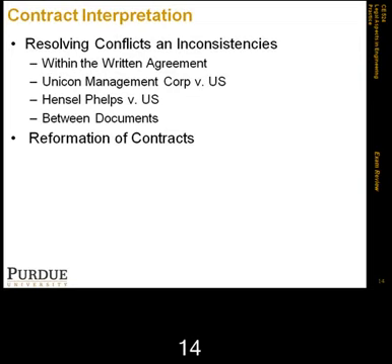Another important topic we talked about is something called reformation of contracts. This is a remedy that's granted by a type of judges we call equity judges, and they try to rewrite an agreement to make it conform to the actual agreement of the parties. And equity cases don't have juries, so the courts are usually freer. Most reformation cases involve things such as improper description of land in a deed, but sometimes there were cases where there were mistakes. There were also reformation cases of mutual mistake.